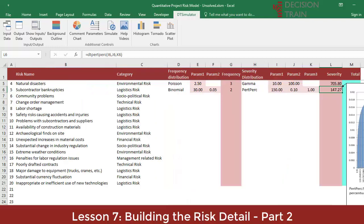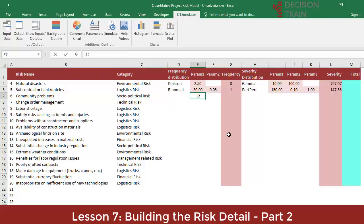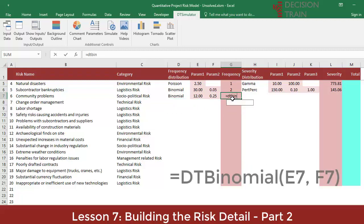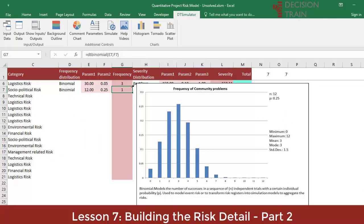Similar to the previous line, the risk of community problems has been structured as follows. The expert has identified 12 communities surrounding the project that could generate problems. The individual probability that any of them will generate problems is 25%. Therefore, a binomial selected in D7 with respective parameters of 12 and 0.25 will generate values in cells E7 and F7. When you position the cursor over G7, you will see the frequency graph. The most likely number of events — the mode — would be 3, with approximately 27% of cases.